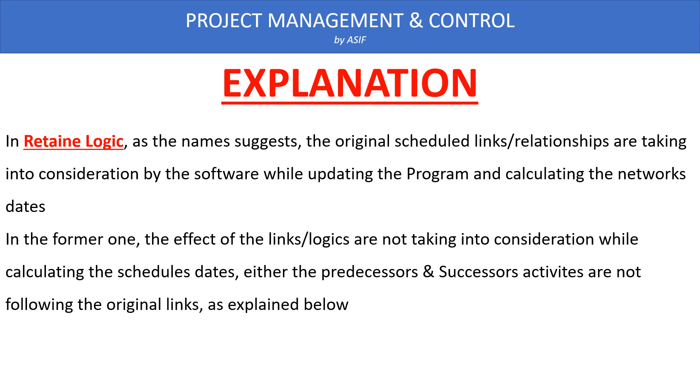In Progress Override, the logic and links are ignored while calculating the effects of out-of-sequence activities on successor activities.